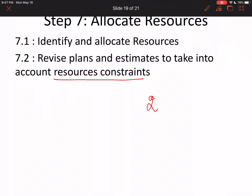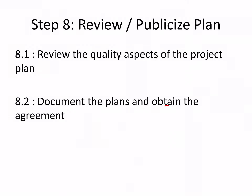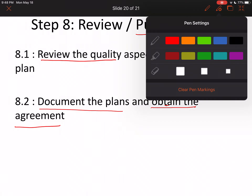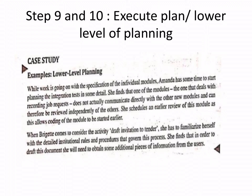Step eight: review and publicize the plan. Step 8.1: review the quality aspects of the project. Step 8.2: document the plans and obtain agreement between all the different parties and stakeholders. Publicizing means obtaining a documented agreement so there is no ambiguity later — everybody, all stakeholders, must agree to the plan.